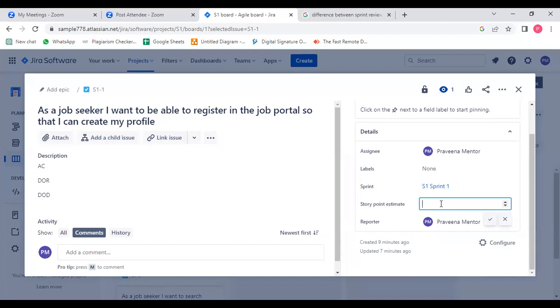In case this particular sprint is not able to complete, then can the project manager reassign it? Yes, it will go back to the product backlog, and again they prioritize the requirements, and again he will add them to the sprint backlog, like that. Again from the starting, you will get that. So that's what the Scrum Master will do. He will try to collaborate with teams. If that work is not done, then again the project manager will send them back to the product backlog, and from the product backlog again he will add them to the sprint backlog. That's it.